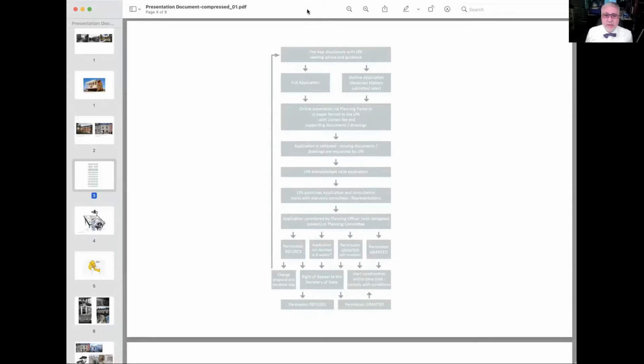That's fine. So within our practice, we present almost every project to the planners via a service called a pre-app assessment or a pre-application assessment. This is where the planners can analyse a proposal against their local and national policies and raise any issues or concerns they have via written feedback. However, this is also the point where they confirm a historic building is locally listed. By this point, we may well have arrived at the bones of a beautiful scheme, only to find out we can no longer progress with that design.